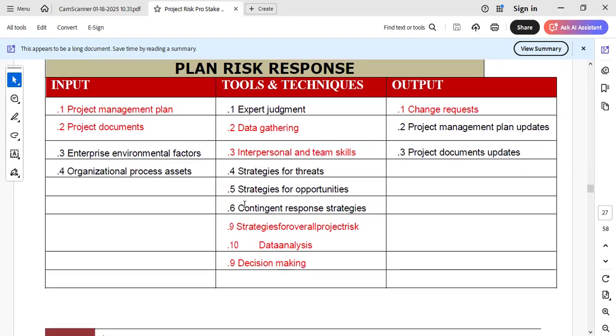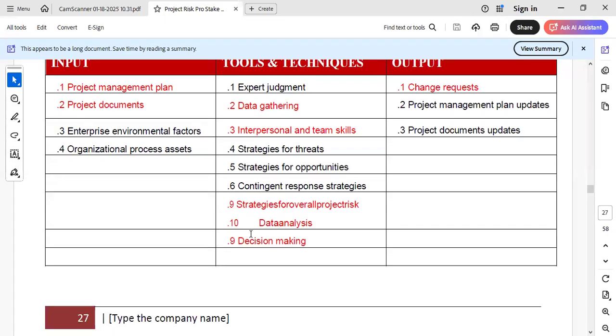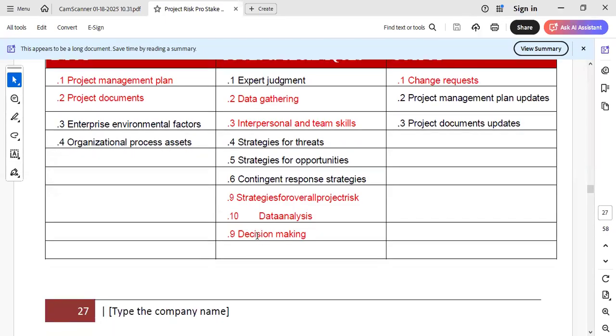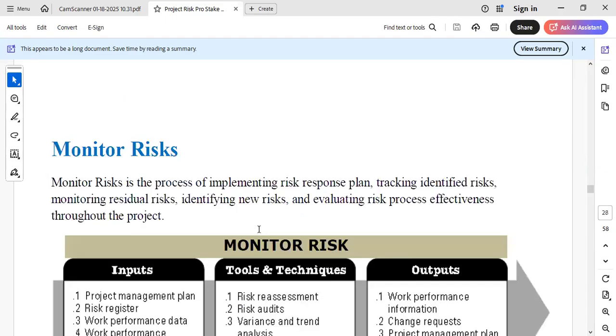So the same routine, those plans, the CATM which we had, is what we are implementing here. In a place where what we will do is not holistic, we raise a change request. And then we monitor the implemented risk. What is monitoring? Monitoring is not only implementing the plan, it's also ensuring that the implemented strategy is giving you the desired result.